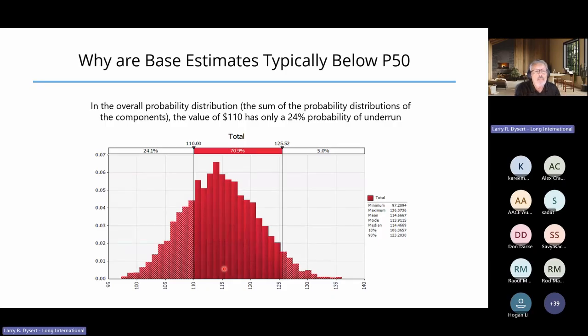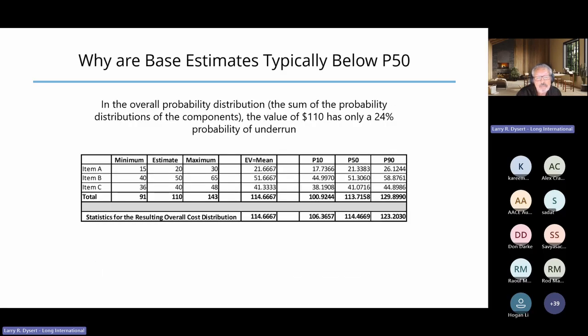So this is a really important concept to understand, because most of the elements in our estimate will typically be skewed to the right. They have a chance for things to go wrong, increasing costs by a higher value than potentially being lucky or taking advantage of an opportunity to reduce costs. So this median value, if that's our funding value, then contingency is nothing more than taking that selected funding value minus the point value of the estimate before uncertainty.